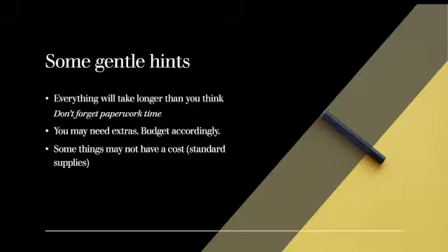First, everything is going to take longer than you think it will. Always budget yourself for extra time because sometimes things are slow. Paperwork often takes longer than you expect, especially if you need a data use agreement or a material transfer agreement, if you need an IRB or an IACUC protocol, build in for yourself the paperwork time. Preferably do some of those protocols prior to submitting the grant or while you are waiting for the results of the grants, just so it's done and it's ready because that takes time.